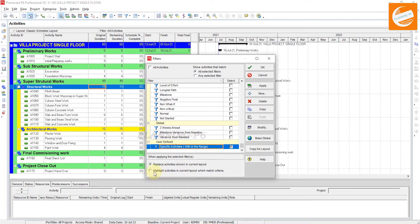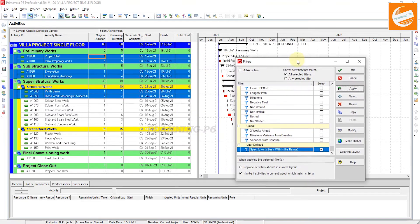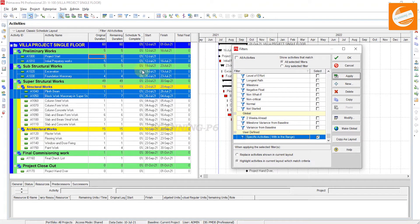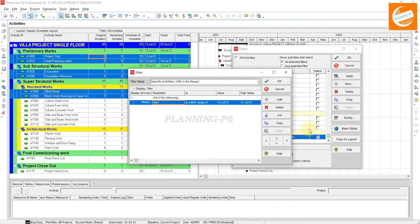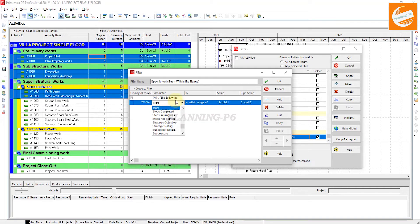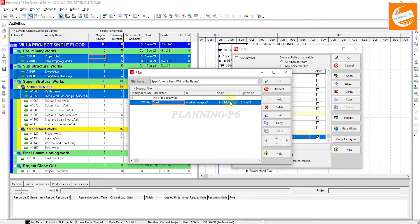After adding these parameters, you can check 'Highlight activities in current layout which met the criteria.' After that, apply it. Now you can see the activities which are planned to start or finish within the timeline are highlighted in the view. You can also modify — if you want to see by finish date, you can change the filter parameter from Start to Finish, and you can change the dates as well.